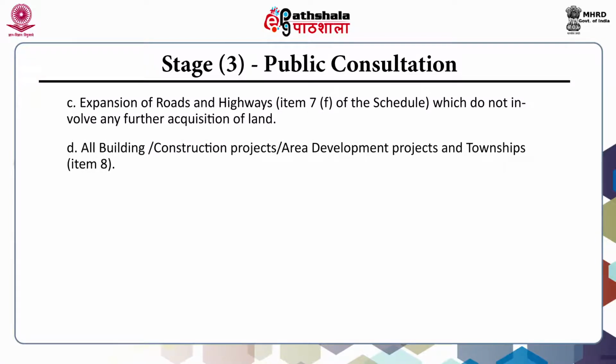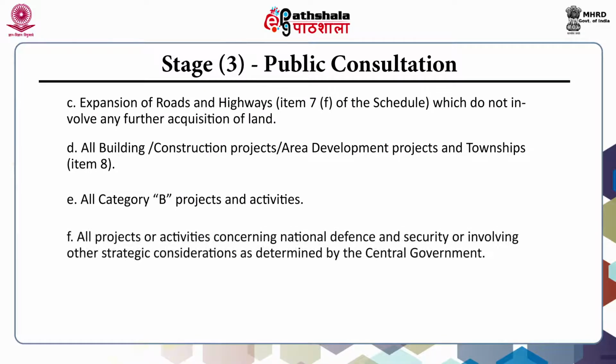Then all building and construction projects or area development projects and townships under item 8 of the schedule. All category B2 projects and activities, and all projects or activities concerning national defense and security or involving other strategic considerations as determined by the Central Government.